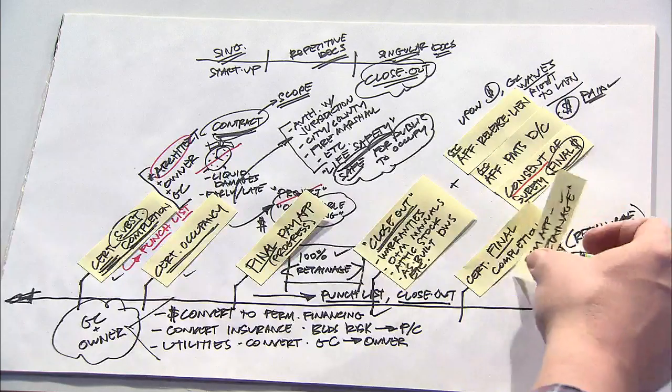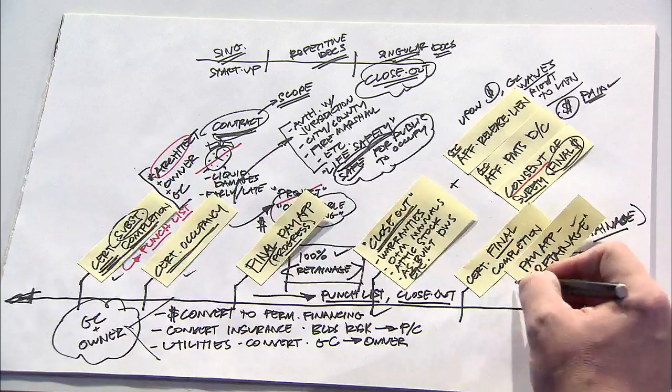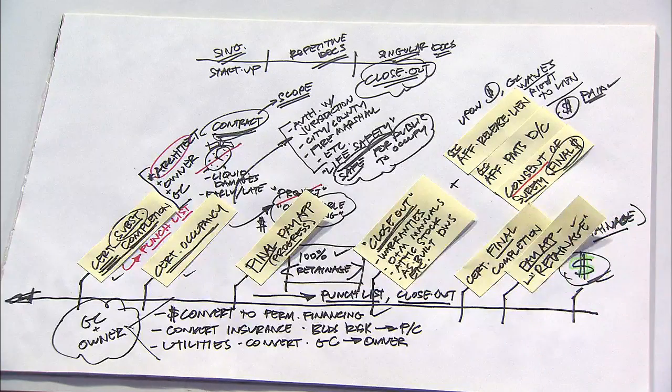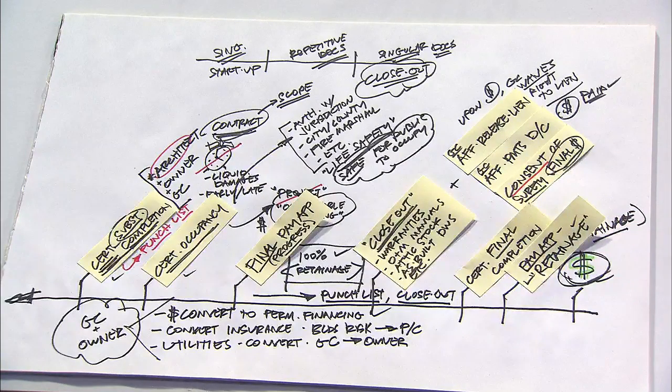And then once that certificate has been issued, then the contractor can issue his final and last pay application for the amount of the retainage after which the owner would then make the last payment.